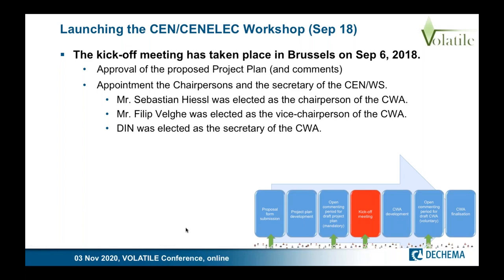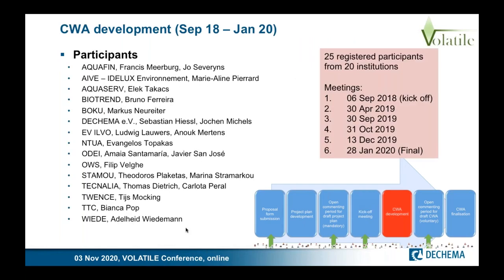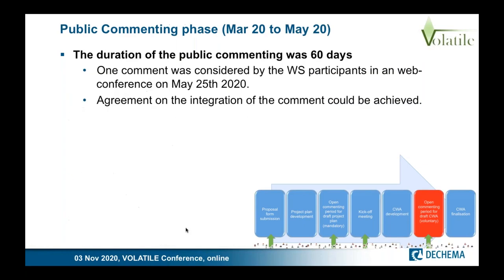Then the formal things are done and the work started. We had six meetings with about 25 registered participants, and this phase took from September 2018 to January 2020. By evolving the project, the CWA was developed by its participants. The final meeting was at the end of January 2020, and then an optional open commenting phase started. We decided to have a public commenting phase, so the draft was published.